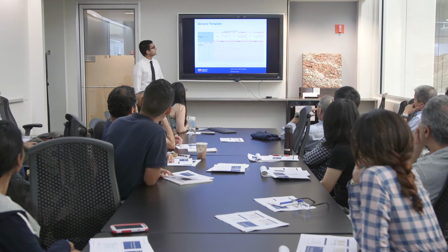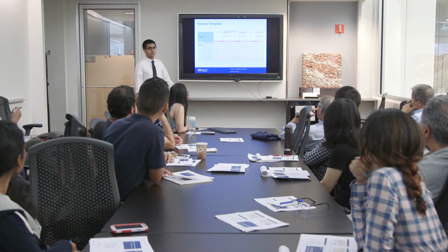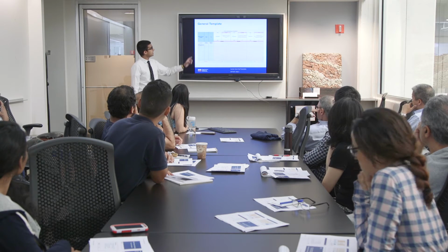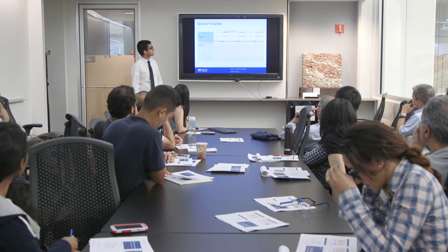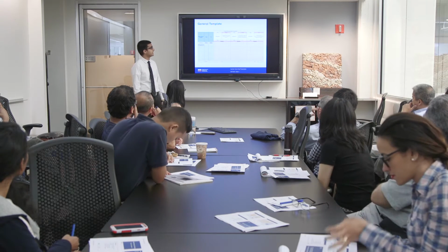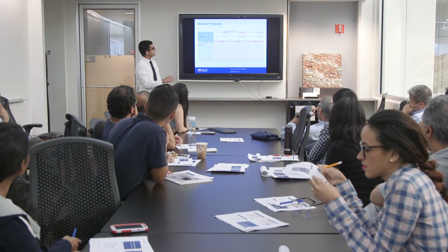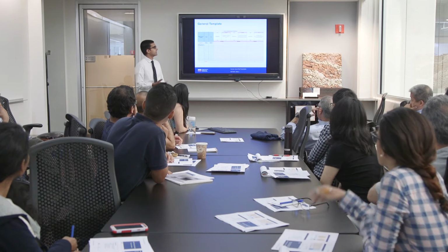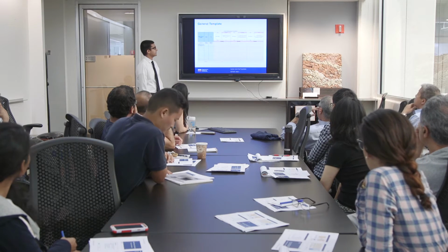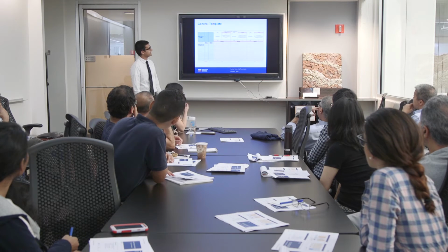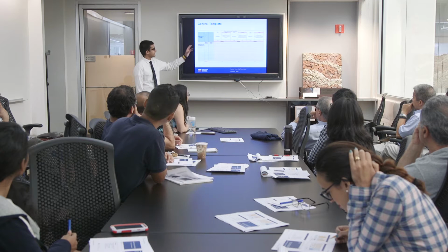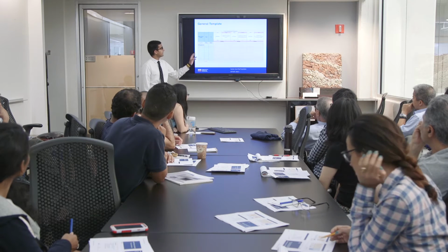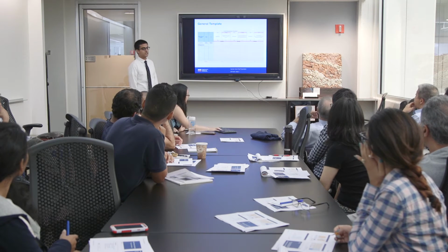So here we input the item number based on the DOT specifications. You give in the item number, suppose 4.09 AM, and you get the description, the steel faced concrete curb, along with the units. And then you would input the location you want. Suppose you want J Street between Metal Avenue and Flatbush Avenue, and then all you have to do is just input how much of that item you want. And then in the end, everything is totaled up and output for each individual segment.